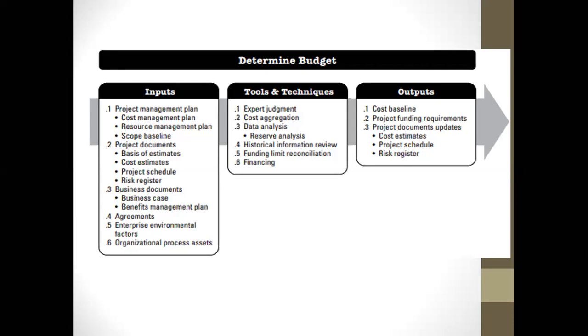So let's say we plan for a unit price of fuel at 65 Naira, and at the end of the day, now we have 120 something Naira. It is better you use contract types like cost reimbursable projects or economic price adjustment projects, so that when such fluctuations come, you can come back for funding limit reconciliation.